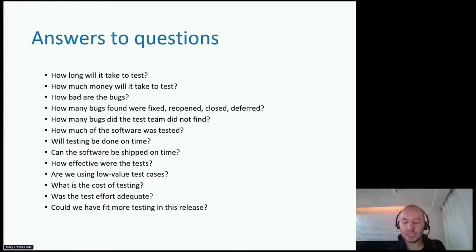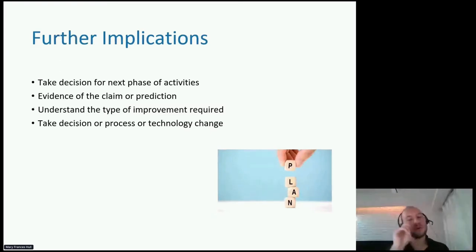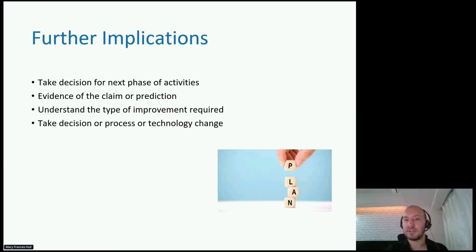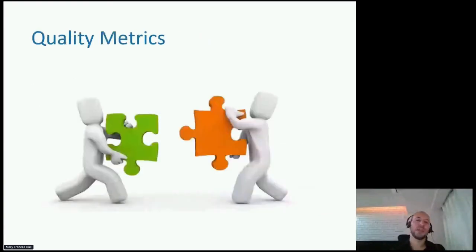Collecting lots of different information helps us see the weaknesses in our processes. For example, I can see I have 10 major bugs, all of the performance type. Then I can conclude that in the next sprint I should concentrate more on performance issues or performance test cases. These kinds of weaknesses and points to improve can be revealed by tracking metrics and different monitoring activities. So let's see what we can do to perform these monitoring activities in the best way.